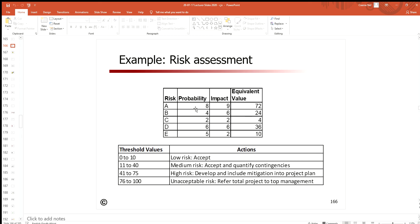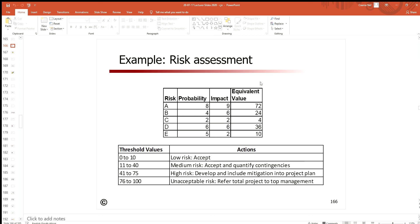What we've done over here is chosen a very simple scale: probability 0 to 10, impact 0 to 10. Low probability 1, 2, 3; high probability 8, 9, 10. Impact, remember, is on the three things we look after in project management: the scope, the cost, and the schedule of the project.